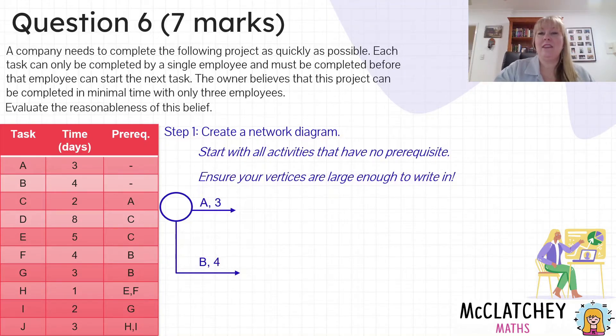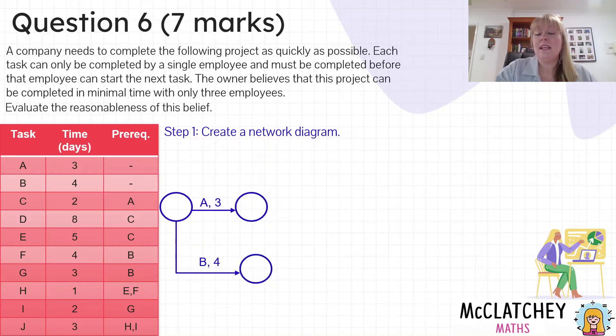We've got activity A and activity B coming out. It's also important to remember that you're going to need to possibly redraw parts of this as you go and discover different things. So I would always say perhaps start with a lead pencil and then go over it with a pen at the end. Coming out of each of these activities is a new activity. The end of that activity is marked with an empty vertex which also starts the next activity. Coming out of the next one we've got C. C comes out of A with a length of two days.